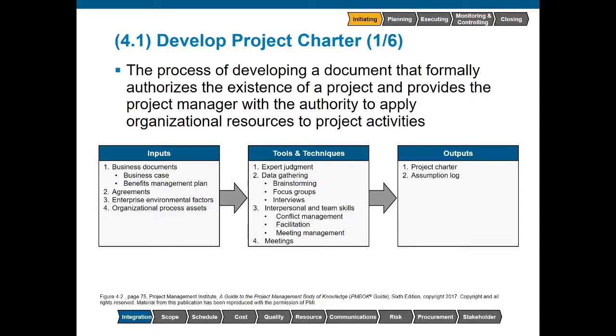Develop Project Charter. This is a process of developing a document that formally authorizes the existence of a project and provides a project manager with the authority to apply organizational resources to project activities. This process is performed once at the beginning of the project or phase. The key output of this process is the project charter.